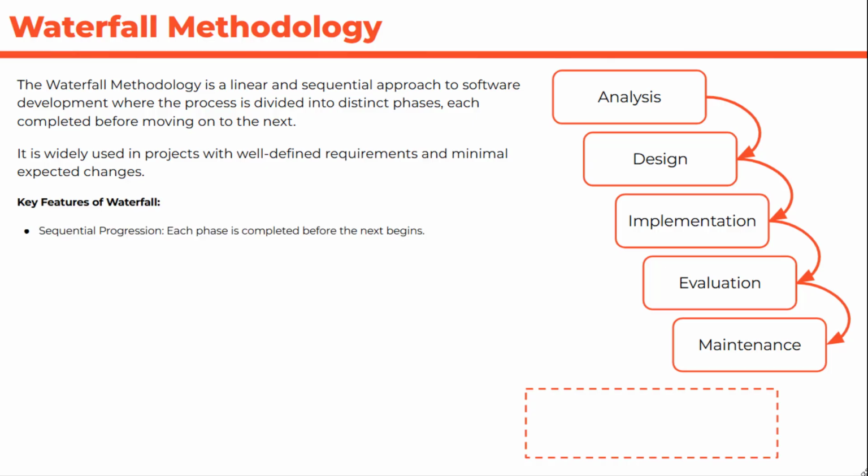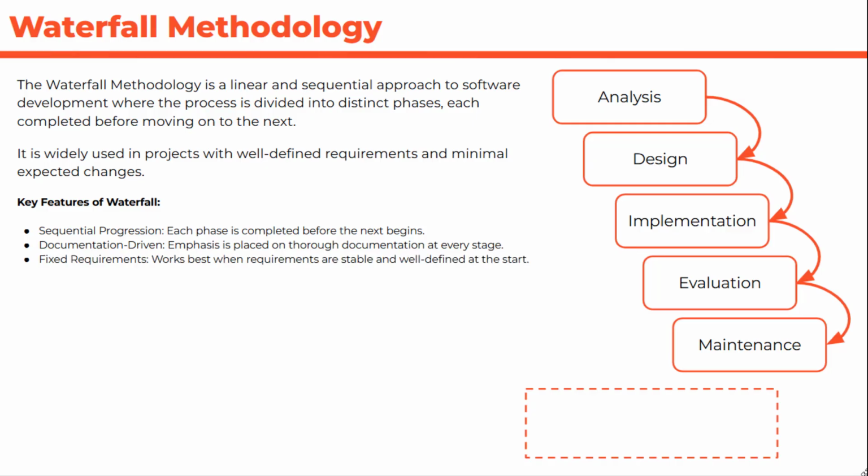Key features that we have in the waterfall methodology: the sequential progression, so each phase is completed before the next one begins. Documentation driven, so emphasis is placed on thorough documentation at every stage, and this is why the government tend to opt for a waterfall methodology, because they're spending taxpayers' money. They need to document exactly what happens at every single stage. You have fixed requirements, so works best when requirements are stable and well defined at the start.